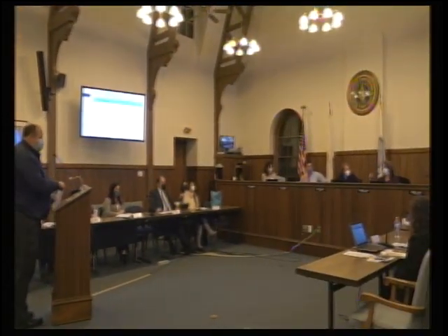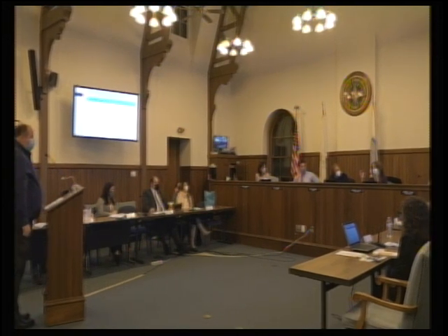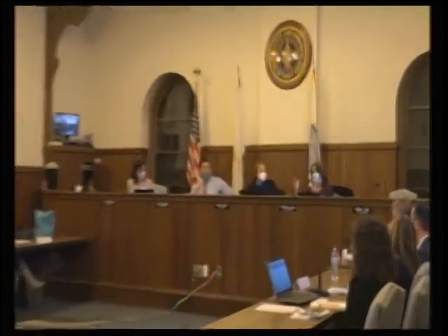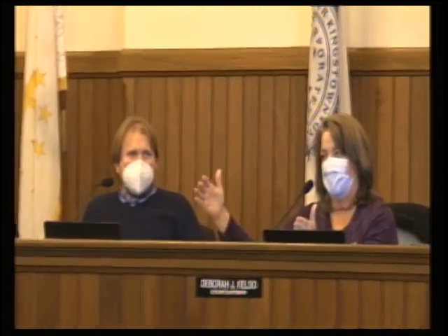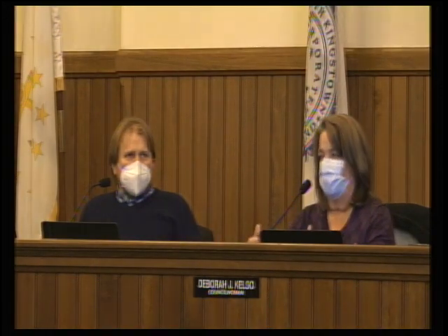I just have a bit of a clarification. So I look at the CIP. The first year, FY23 right now, will be in the budget that the school committee will approve going forward for next year. Everything in the years out from that is kind of, this is on our radar screen, and we're thinking we might have to do this, or we might want this. And that's why it's so changeable, because what you may need right now may change by the end of next year. So the CIP is a framework for what may happen. So everything past FY23 is always subject to change.